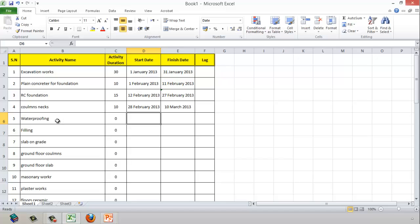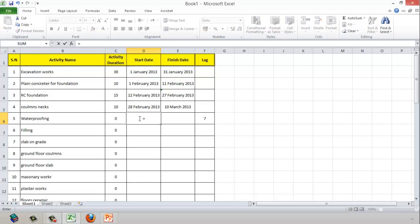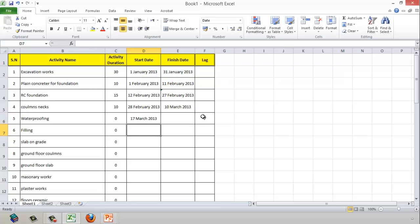Waterproofing will start after the completion of the column neck, but we need to wait 7 days for curing — that's the lag. So the start date equals the finish date of the previous activity plus the 7-day lag. Waterproofing will take 4 days to complete.